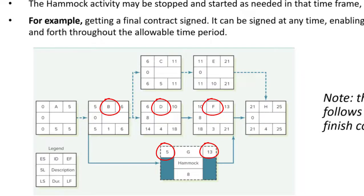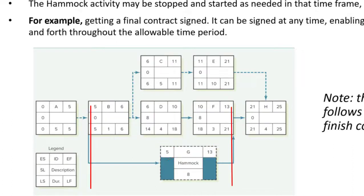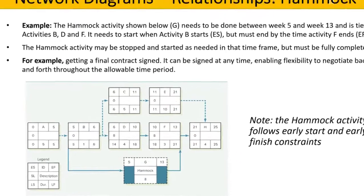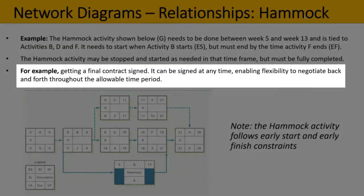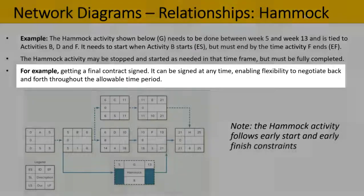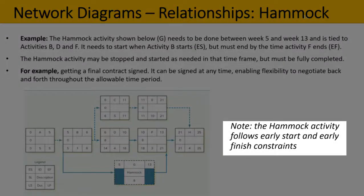The hammock activity needs to start when activity B starts — the early start — but must end by the time activity F ends, the early finish. The hammock activity may be stopped and started as needed in that time frame, but it must be fully completed by the end of activity F. For example, getting a final contract signed: it can be signed at any time, enabling flexibility to negotiate back and forth throughout the allowable period, but by the time that period is over, the contract must be signed. The hammock activity follows early start and early finish constraints.